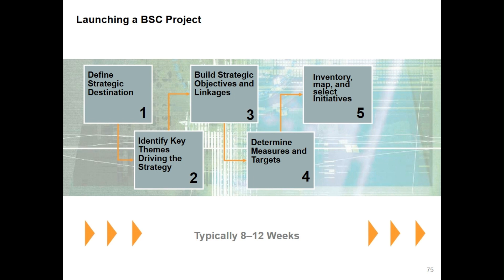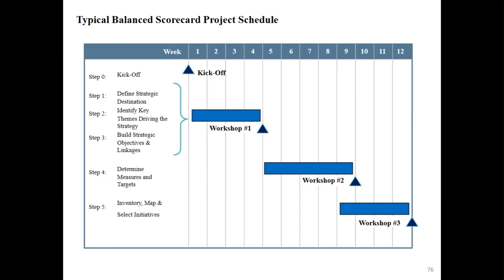The typical balanced scorecard project schedule: Step 0 is the kickoff in Week 1. Step 1 is to define strategic destination. Step 2 is to identify key themes driving strategy. Step 3 is to build strategic objectives and linkages — Steps 1, 2, and 3 take 4 weeks. Step 4 is to determine measures and targets (4 weeks). Step 5 is to inventory, map, and select initiatives (4 weeks).